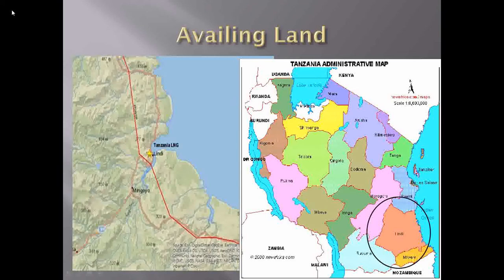However, before the lenders approve the loan, a scenario can arise where they will be required to carry out due diligence to establish the circumstances under which the land was granted, among other things. The process might take long, approximately 2 years, and this means that the start of this project may be further delayed by 2 years.